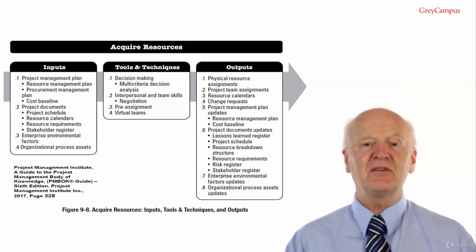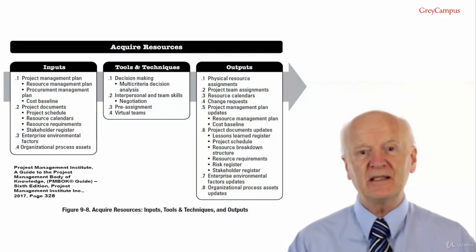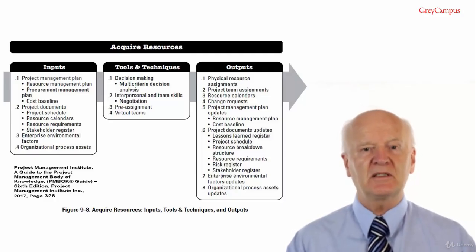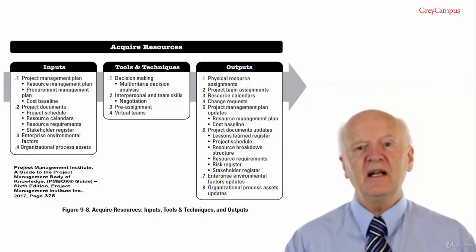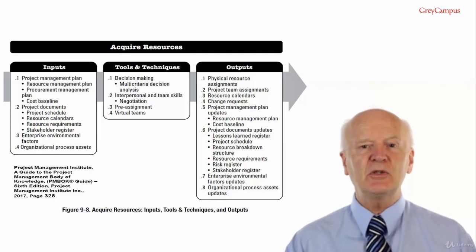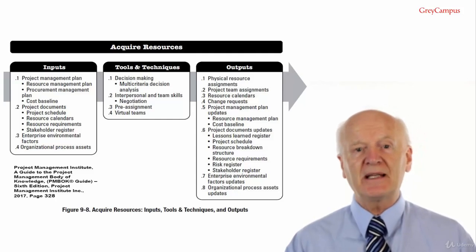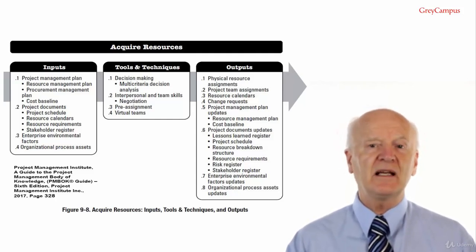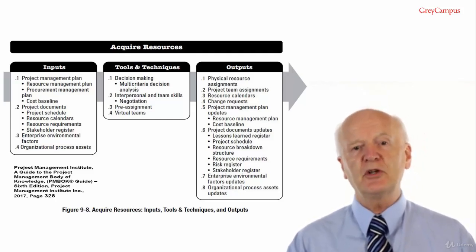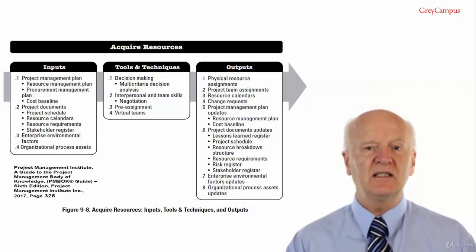Now, if the other stakeholders had remembered Albert and Albert had been included from the beginning, we would have known his expectations, which were that he didn't actually need to procure a lot of the project resources. The reason for this was that a previous project had been cancelled. The other stakeholders knew that the previous project had been cancelled, but they didn't realise that the resources that had been procured had not been returned.